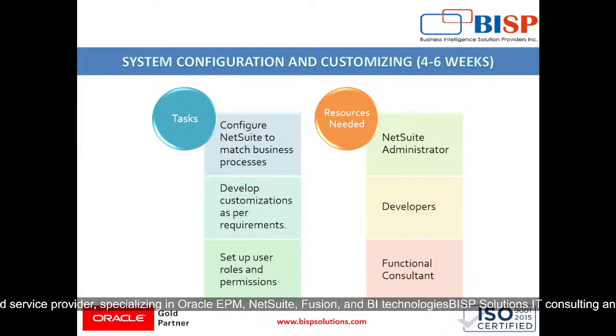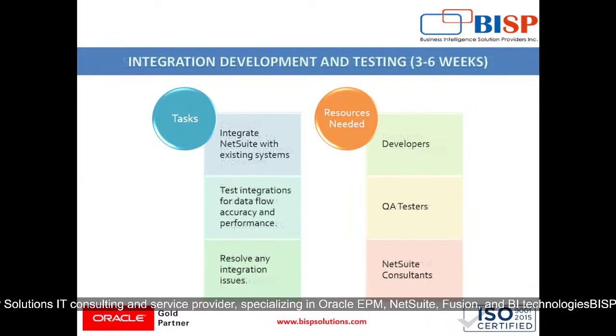Then system configuration and customizing, which will take around 4 to 6 weeks, where the task is to configure NetSuite to match business process, developing customization as per requirements, and setting up user roles and permission. So what resources are needed? It requires NetSuite administrator, developers, and functional consultant.